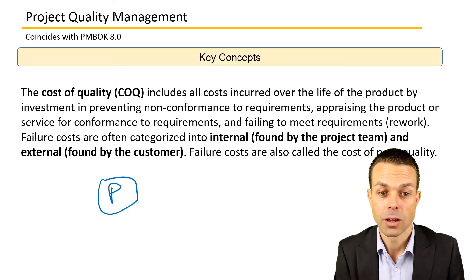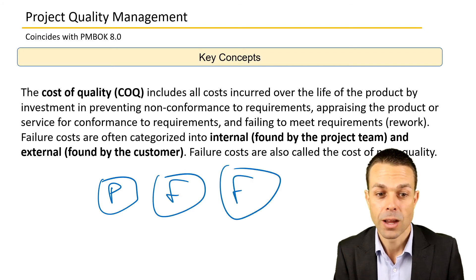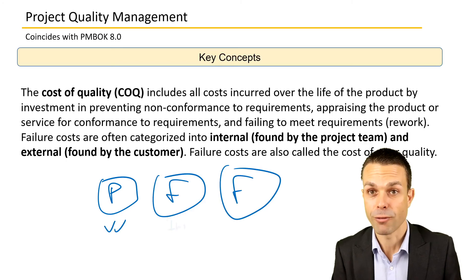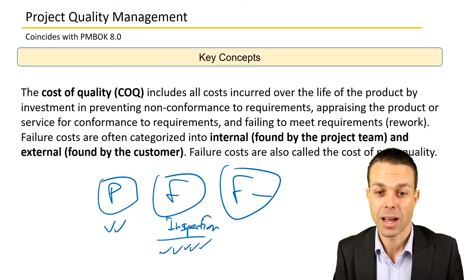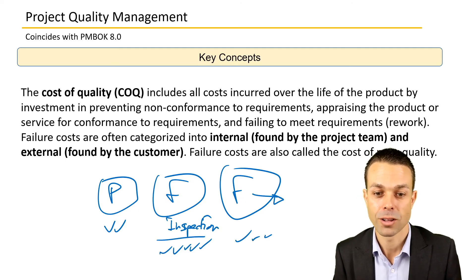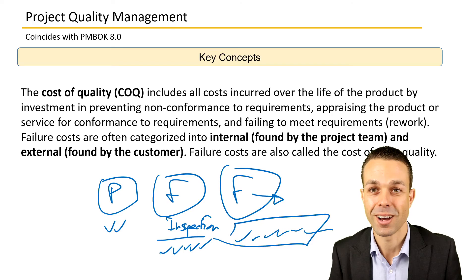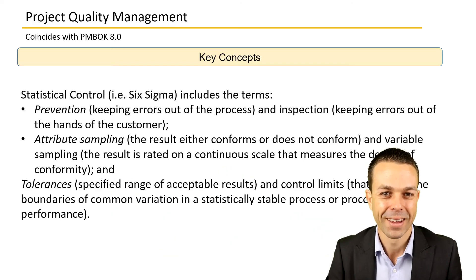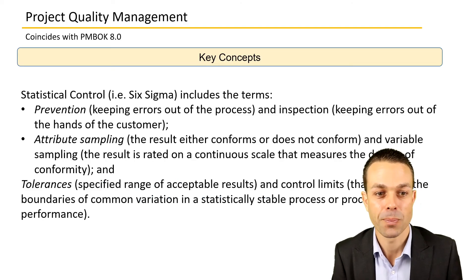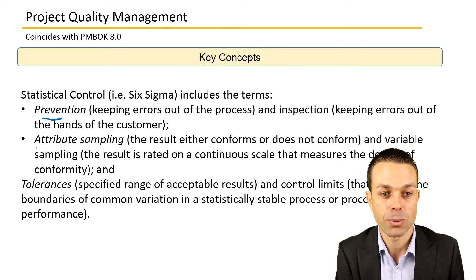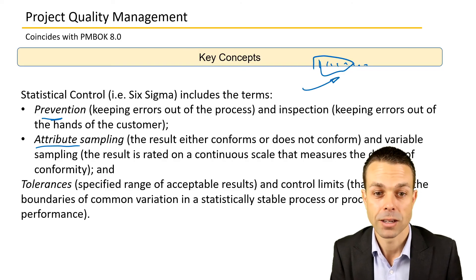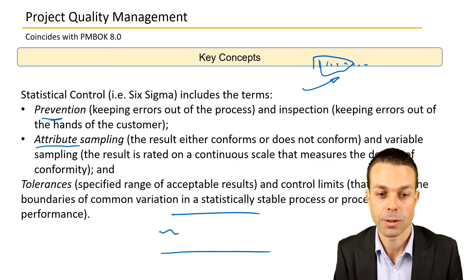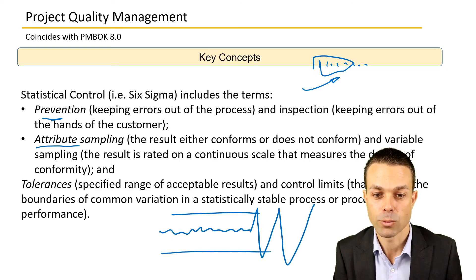Preventing errors is often the least costly approach. Finding them through inspection is a bit higher cost. But having to fix them once they've been found by a customer — that's usually the highest cost, including brand damage. Statistical control, for example six sigma, includes prevention, attribute sampling — where you might sample five out of a hundred items to get a good idea of how things are tracking — and tolerances or control limits, where if something goes out of those control limits, you need to bring it back on track.